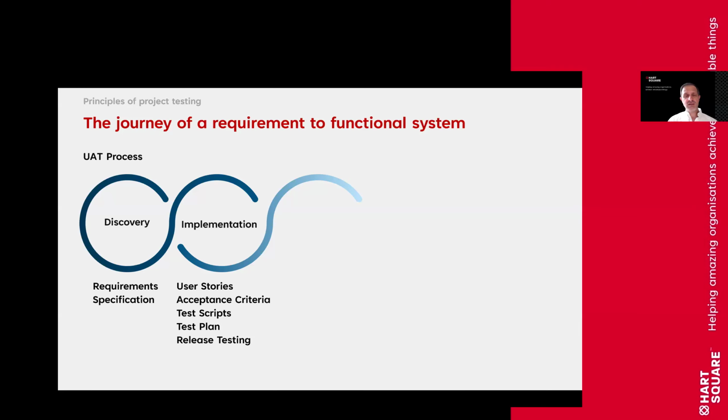If your project is doing an iterative release type model where your tech partner is showing you things as they go, which is a great way to ensure that you can validate and see the solution, then you should really be doing some degree of release testing, which is a great way of breaking down the amount of work that you could find in UAT.